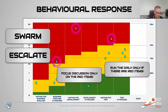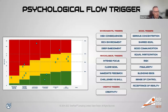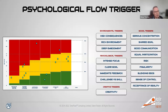When there is a red item, the behavioral response is: first, swarm — the whole team resolves the issue internally. If they cannot, they escalate — that is where informational flow comes in, triggering the management side's behavioral response as well. This working agreement with management ensures collective minds focus on the problem at hand. Remember: everybody stands behind Herbie, and the topmost red dot is Herbie in this situation. That subordination — and asking management for help if stuck — is how the approach exercises seventeen of the most powerful flow triggers, literally taking teams off.